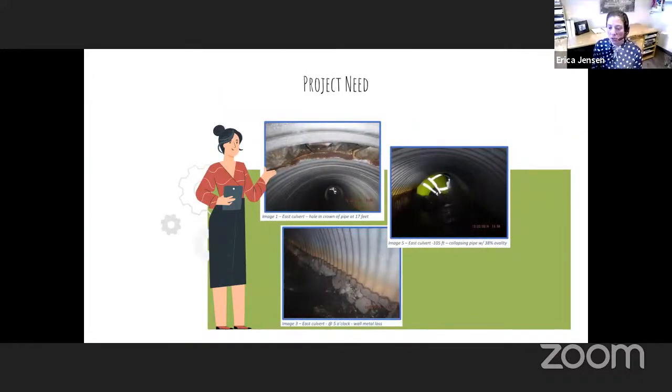Here is the culvert. So this was Stuffel conducting the storm drain inspection. You can notice the date, December 22nd. And if you remember, the RFP was advertised December 23rd. So not only was this project fast-paced from the design standpoint, it was fast-paced from everything. So MOA PM&E was working December 22nd, getting this report from Stuffel, submitting out the RFP on the 23rd. So everybody involved in this was so dedicated to making this work in the timeframe that we had allowed.